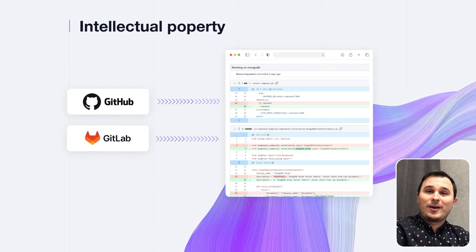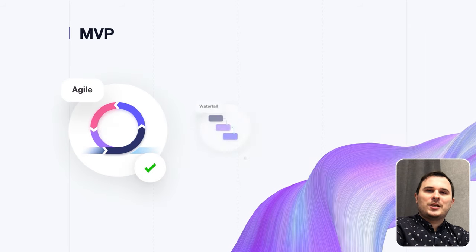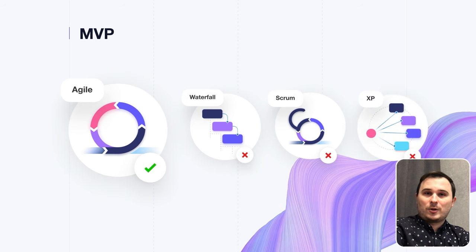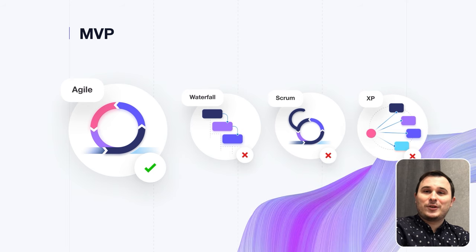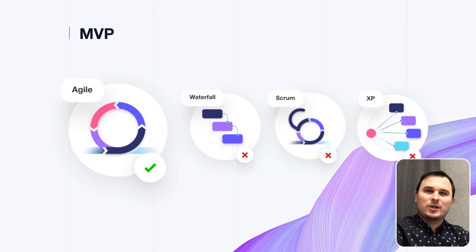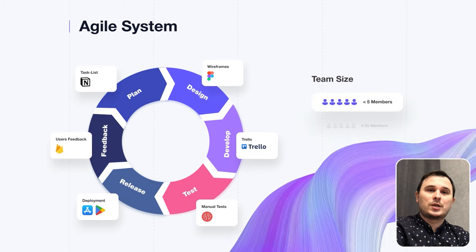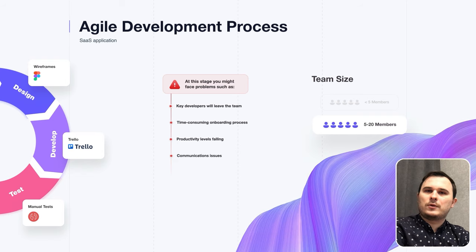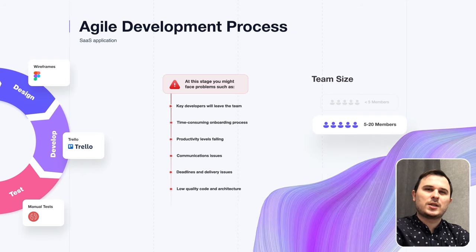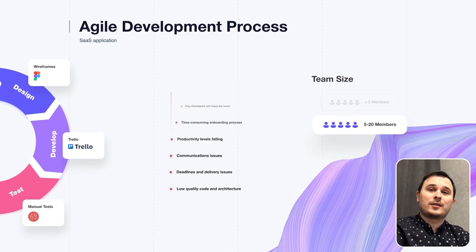For your MVP, I recommend utilizing the Agile process — one of the most powerful methodologies that can significantly speed up your development process. However, in some situations it can actually slow down your project by up to 30%. With a small team of five developers using simple tools like Trello, Notion, Miro, Asana, Monday, Google Docs, and quick Zoom meetings, Agile works well. However, as your team expands to 15 or more people, you may face challenges such as losing key developers, complex onboarding processes, reduced productivity, communication issues, missed deadlines, and a decline in code quality.